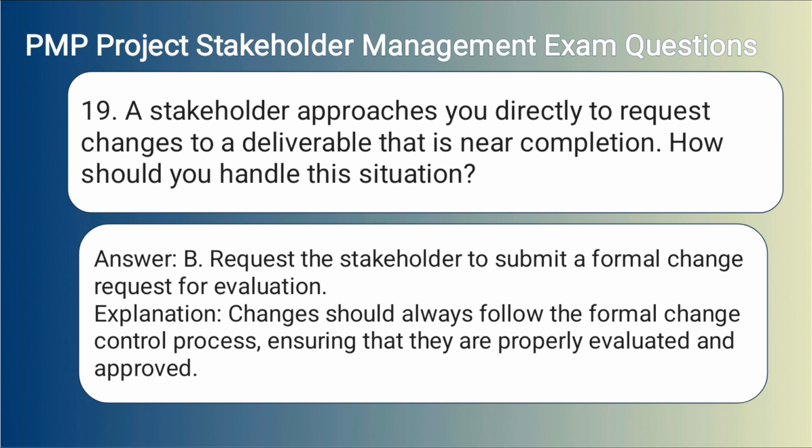Answer: B. Request the stakeholder to submit a formal change request for evaluation. Explanation: Changes should always follow the formal change control process, ensuring that they are properly evaluated and approved.